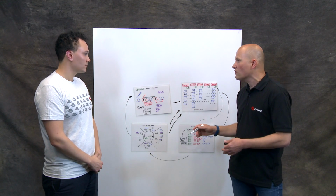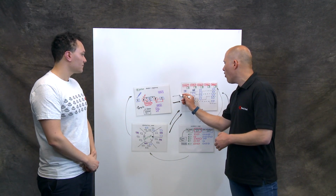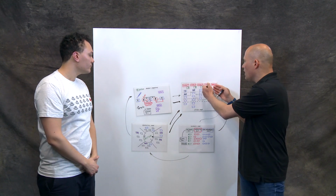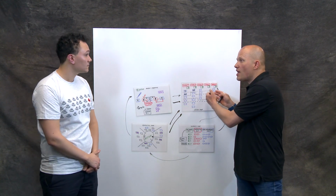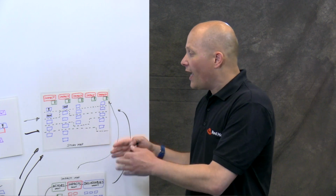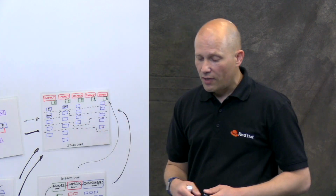The how might we's that we may identify, how might we improve that journey, or the commands that we can translate into stories. All of them would naturally flow into the story map, where we can see the whole product emerge. It will also allow us to identify gaps in our design. Exactly. So do we have an important actor, an important impact for this actor for which we are not designing? There's a gap. And it will allow you to slice this product into various iterations, various different deliveries.